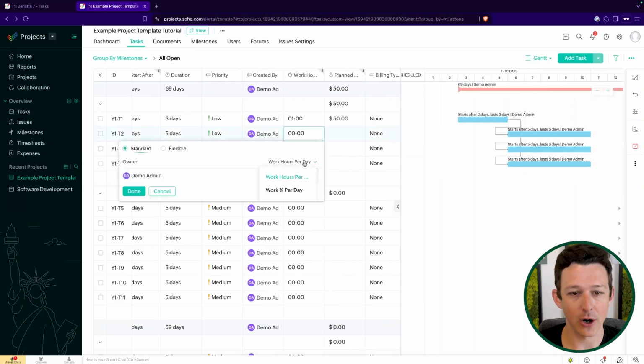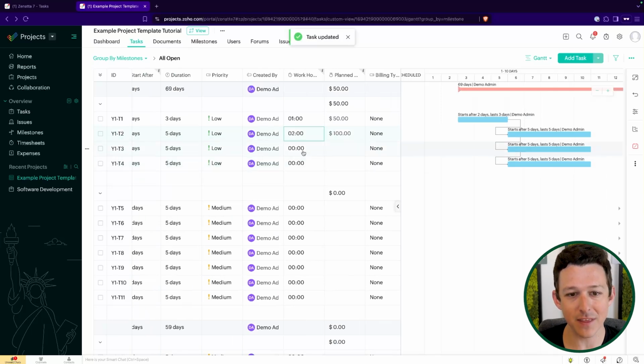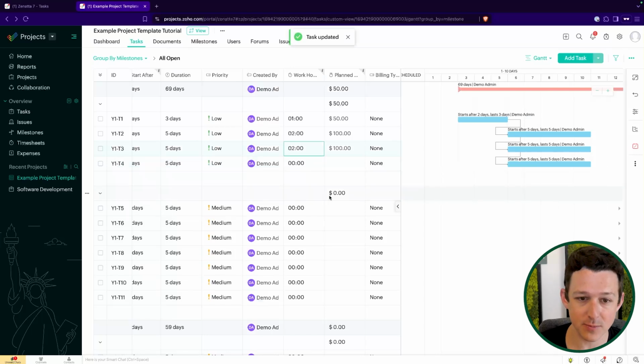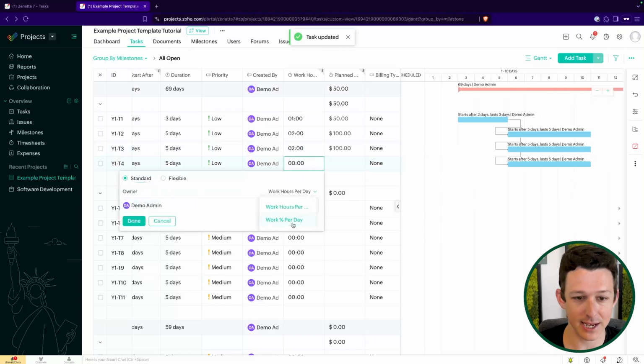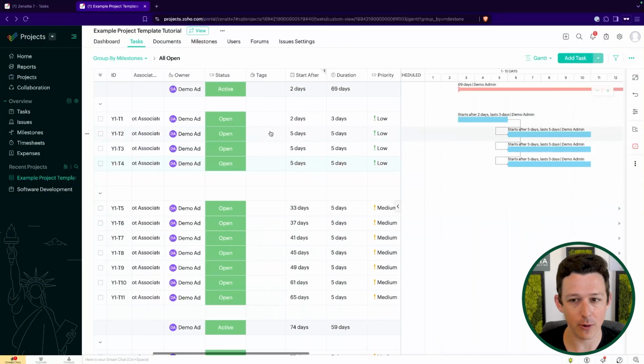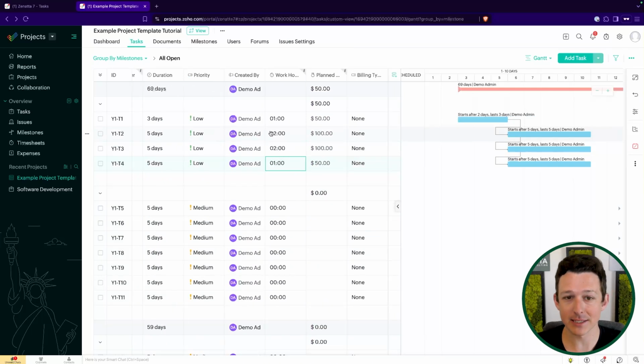These work hours are an estimate, right? So when we're setting them in a project, we're looking at what we think it's going to take. This is an opportunity to pull some data about previous projects and get a realistic idea of what it looks like, right? How long does it take us to write up a project scope? How long does it take us to implement a script that looks like this, right? And so we're coming in and setting these estimated work hours so that we can track against them from a budget management perspective, as well as from a workload management perspective, right?